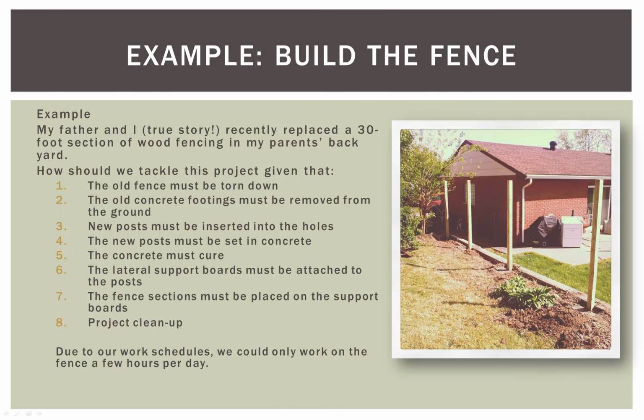Now, of course, this is actually a fairly involved project for something that on the surface would seem so simple. Now, the question is, how should we tackle this project given that, 1, the old fence had to be torn down, 2, the old concrete footings for the posts had to be dug out of the ground, which was real fun. The new posts must be then inserted into those holes, and then the new posts must be set in concrete. That concrete has to cure, has to set.